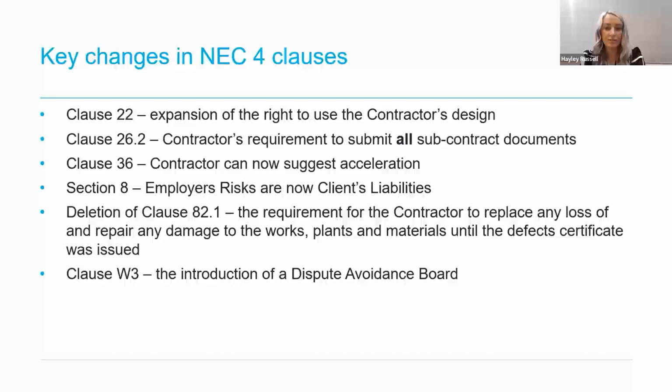The provisions are similar, but they are not the same. One of the key changes to that section is that previously the contractor carried all of the risks that the employer did not hold. That provision has now been removed because it was far too wide and uncertain, and it has been replaced with contractors' liabilities, which can be reviewed against the agreed risk profile and insurance arrangements.